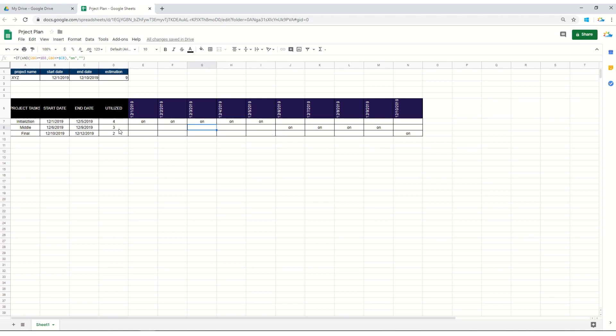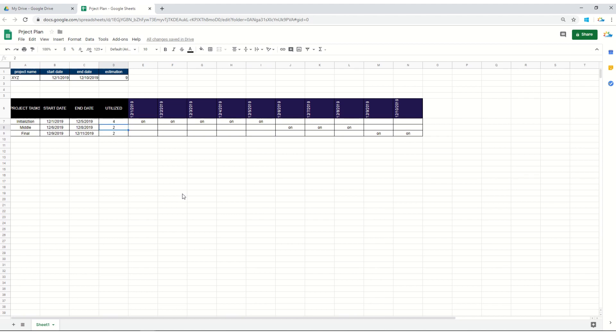So it will change accordingly. Like for example, if I'll say it's four, you can see the changes there. If I'll say it's two, you can see there are changes. So it's pretty simple. The reason it's not overlapping is that we are always using plus one with the end date.